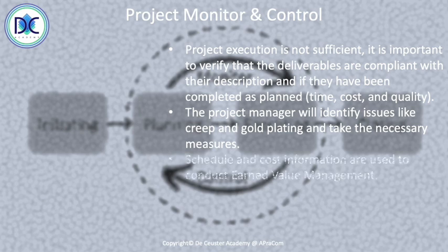We also use the schedule and cost information to do earned value management. Earned value management will provide us estimates of the conditions of completion of the project, when will it be completed, what will be the cost at completion. It also provides us the difference between the plan and the actual status of the project, and we can communicate that with the stakeholders.